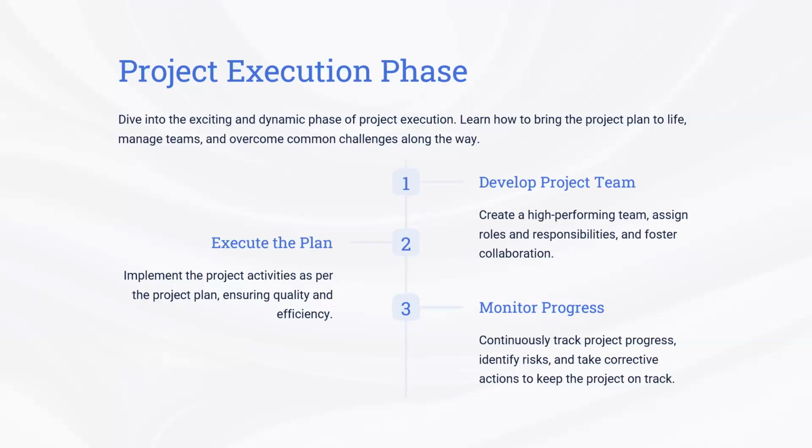Like maybe the one whole project can be broken into at least 5 to 6 small projects. So once the first smallest project is over, a review can be done, the progress can be monitored, and if any change has to be made or implemented, that can be done. And once all the team members are satisfied with the result of the first project, then they can move on to the second small project.